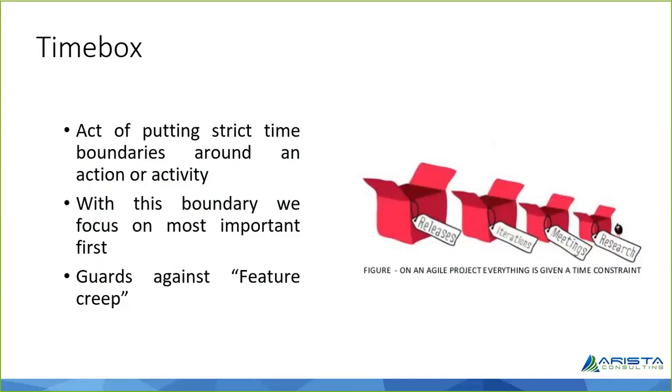So what happens to those 3 items? Now those 3 items are left undone. So what you need to complete that. Again, whatever is left, those 3 items are deposited back to the list and you get it back again.